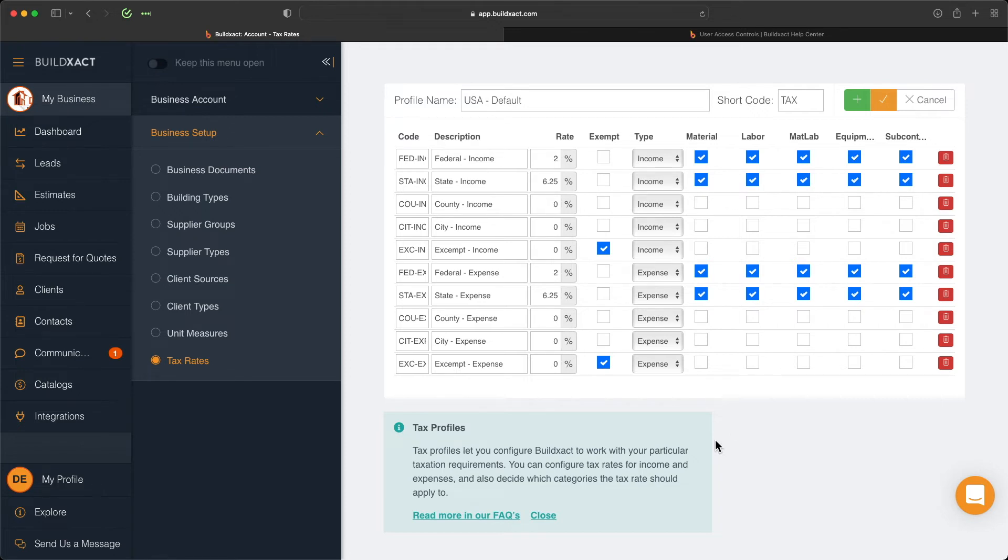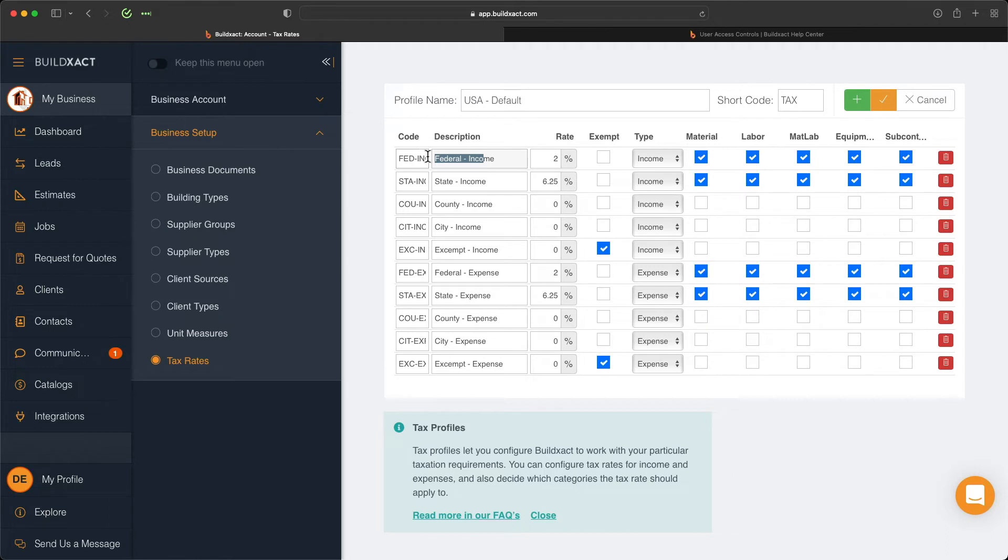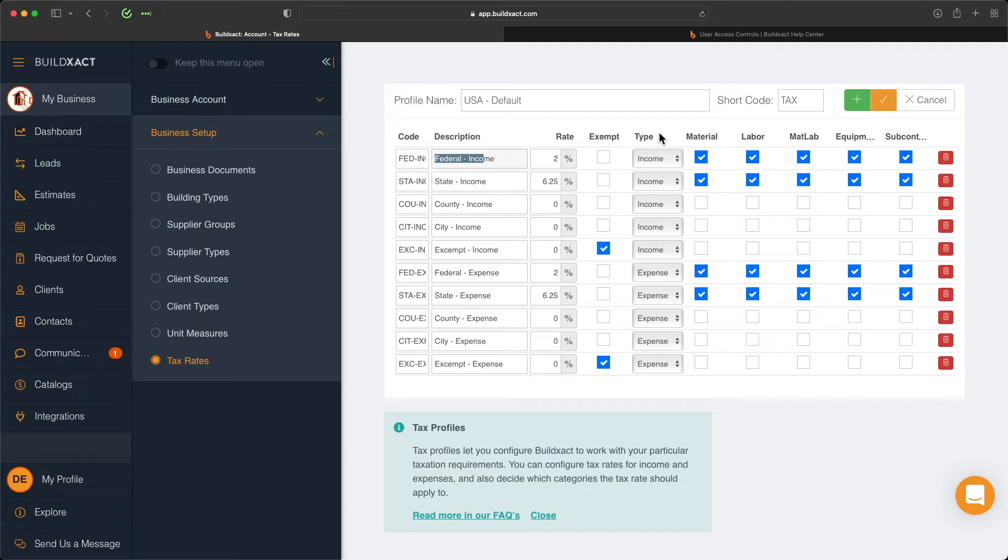Using the United States as an example, you can see right at the top here I have federal income tax set at 2%, and we have a code here that's Fed-Inc. We've told BuildExact that this tax is applicable to material, labor, MATLAB (which is essentially just supply and install, a combination of material and labor), equipment, and subcontractor. We've told it that because each of these is ticked on for each of those types. What we're saying here is when we're dealing with estimates, variations, change orders, or invoices, we want to by default apply this 2% income tax to all of these items.